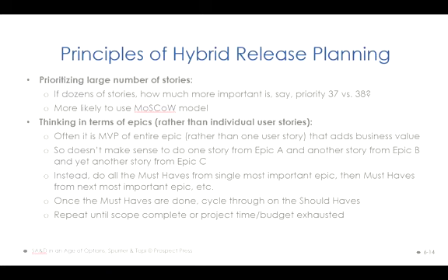So it is a prioritizing method. You look at something desired by the user story and say, okay, something must be done first, something should be done next, and something could be done, or maybe not. That's how you think of different levels of importance in terms of the user story and the product backlog.